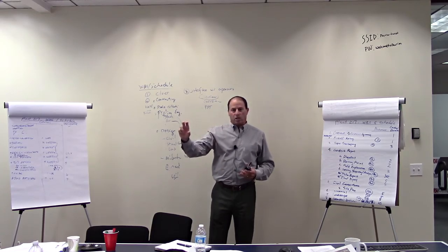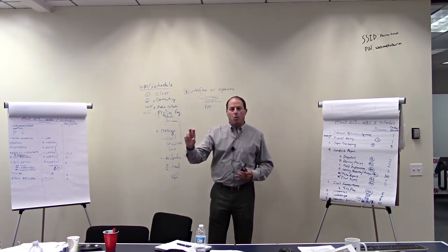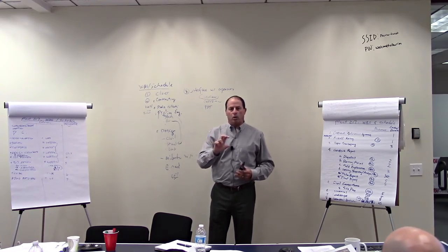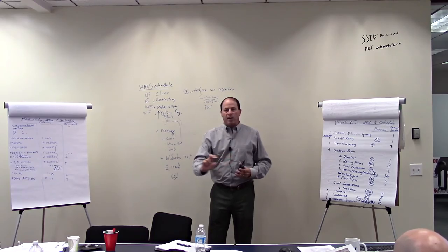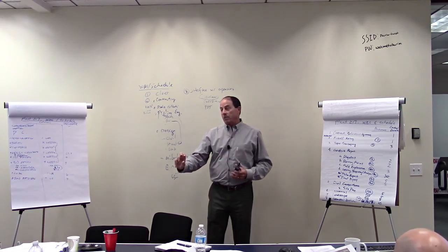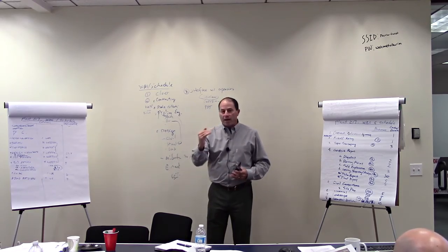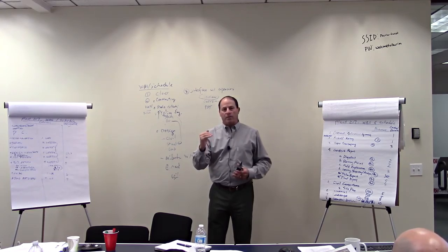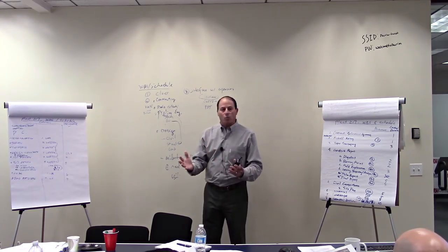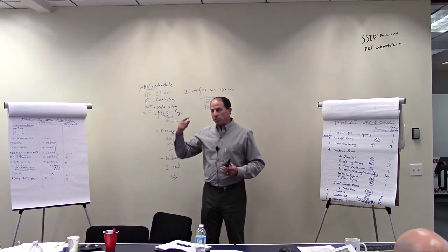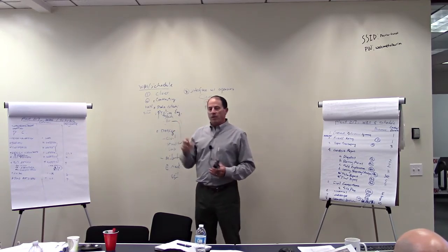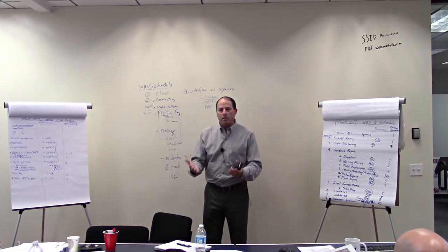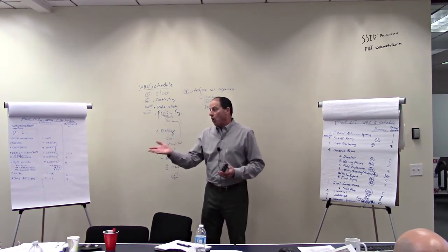So on this, and this is true for both civil and structural, I probably would have said, because remember, I'm trying to figure out our breakdown structure and I want the client to know what we're doing. I might have said develop drainage concept, because I read all this stuff about ditches in there. Develop drainage concept, develop wall sections, and develop grading, something like that. Those three then lead to the finalized memo. You see where I'm going with that?